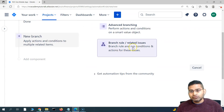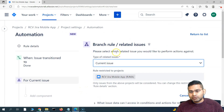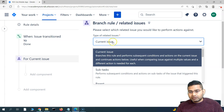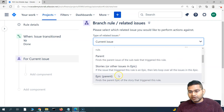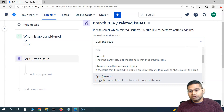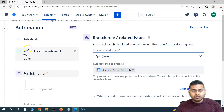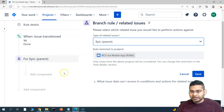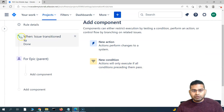We are working with the epic and its linked issues, so we'll add a Branch Rule for Related Issues. The first thing is to select which related issue to perform the action against. We want to choose Epic (which is the parent). This will find the parent epic of the story that triggered this rule. So when an issue transitions, it checks the epic it is linked to, and we save it.